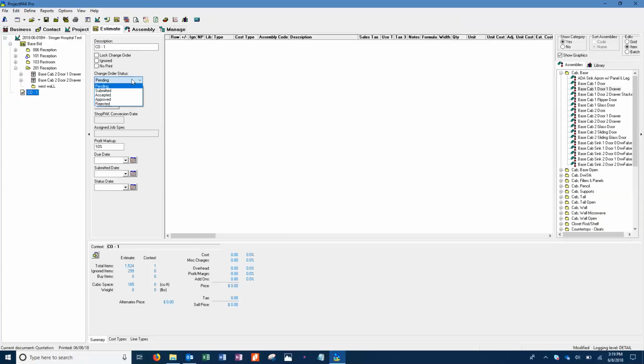The beauty of those two, I've had people say, well, what's the difference? The difference is that if you've ever made something that Bob on the job site told you to make, and then you try to bill it to the wonderful owner, and they say, yeah, sorry, I didn't sign a contract on that. I never approved that. You ate that cabinet. And we've all done it. So we've got a nice little default in here that makes you send it to approved.